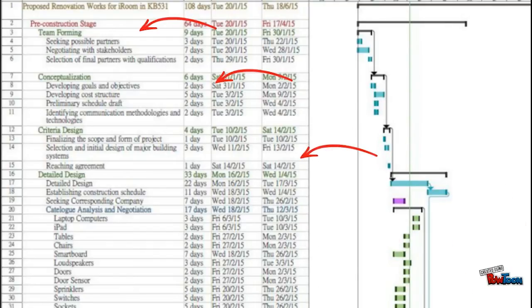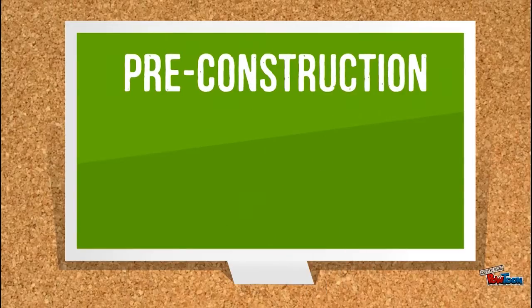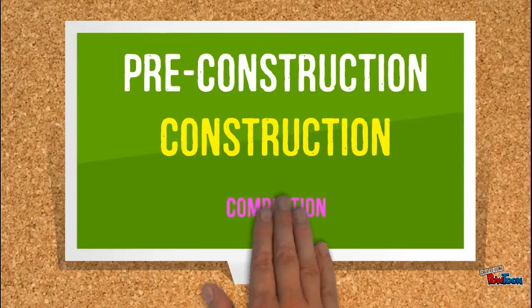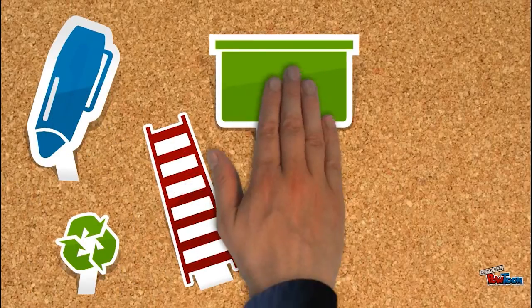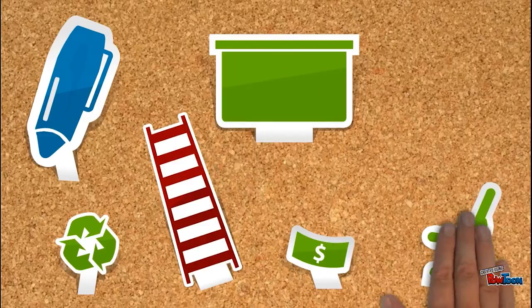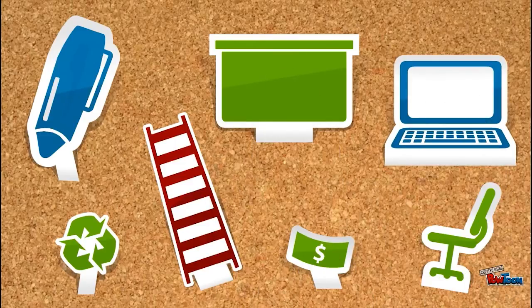and the finishing date. The whole project could be divided into 3 stages, which are pre-construction stage, construction stage, and the completion stage. Those stages include design drawing, renovation, fitting out works, and facility and equipment purchasing. Some of them will be overlapped with each other because they could be carried out at the same time in order to shorten the period of renovation.